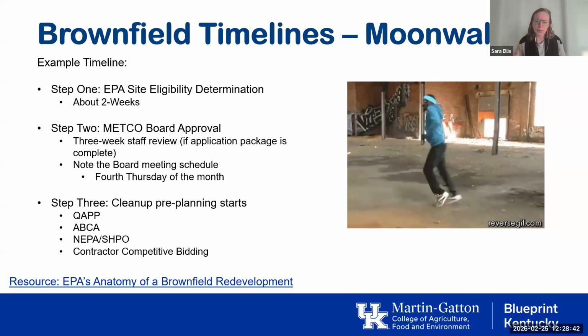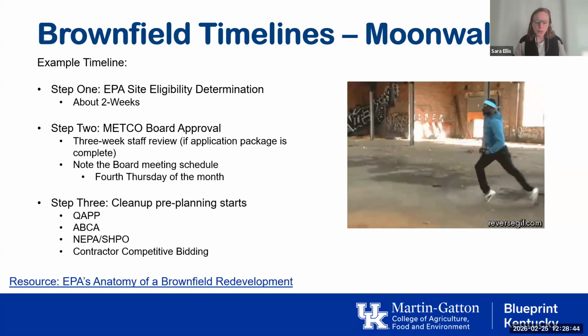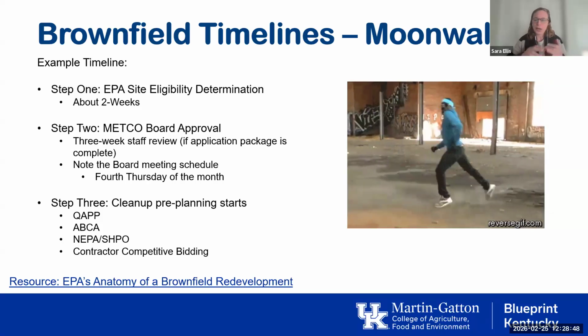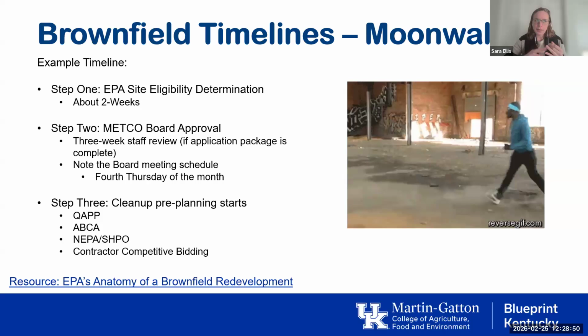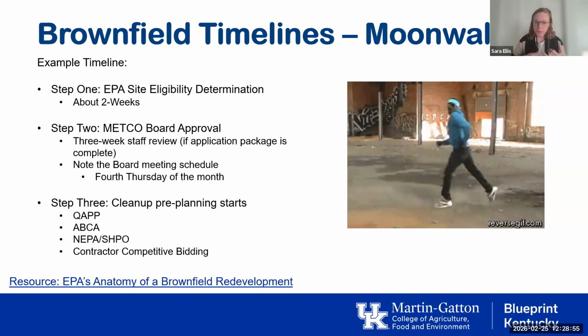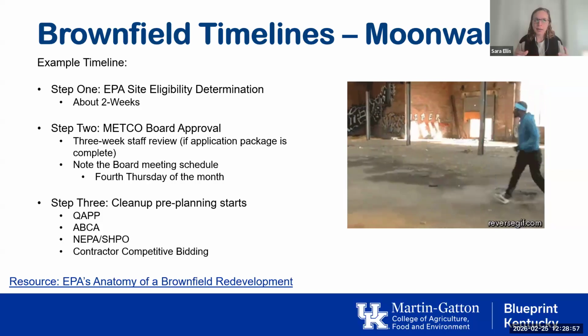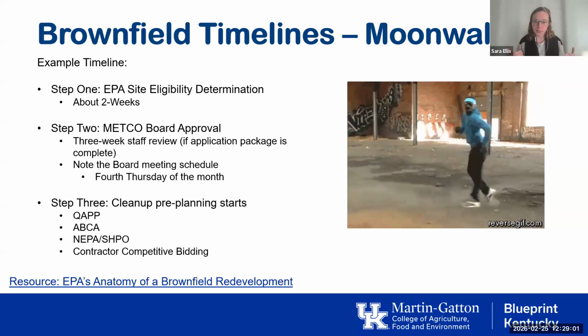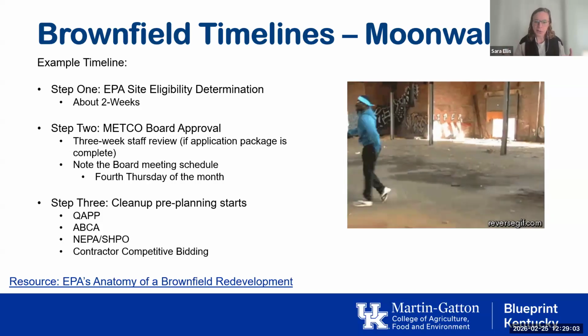But the big point I wanted to drive home on this was if you are going before a board, you just have to think about the timing. Because, so we got your site eligibility, great. Next, the application goes to the METCO board. And for that, that means there's some staff review time. And always think staff review time on a best case scenario for us is 3 weeks. But if something is missing, it probably starts the clock over.